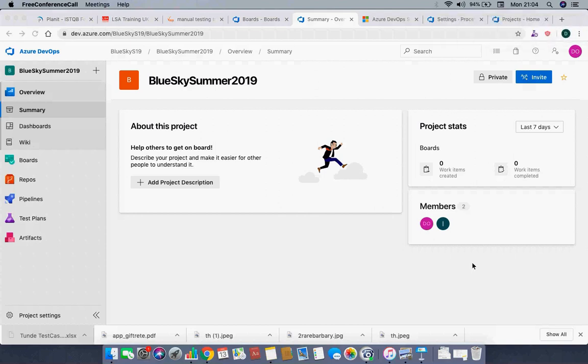All right, I've got some questions. What is a sprint? I'm going to talk about that. Is it possible to use this tool for Kanban? Yes, it's possible to use it for Kanban also. Scrum and Kanban are kind of similar, so you can use it for Kanban as long as you have your product backlog items. The only thing is that you don't have the concept of sprint in Kanban, so you just don't create a sprint and don't assign to the sprint, because Scrum is the one that uses the sprint methodology.